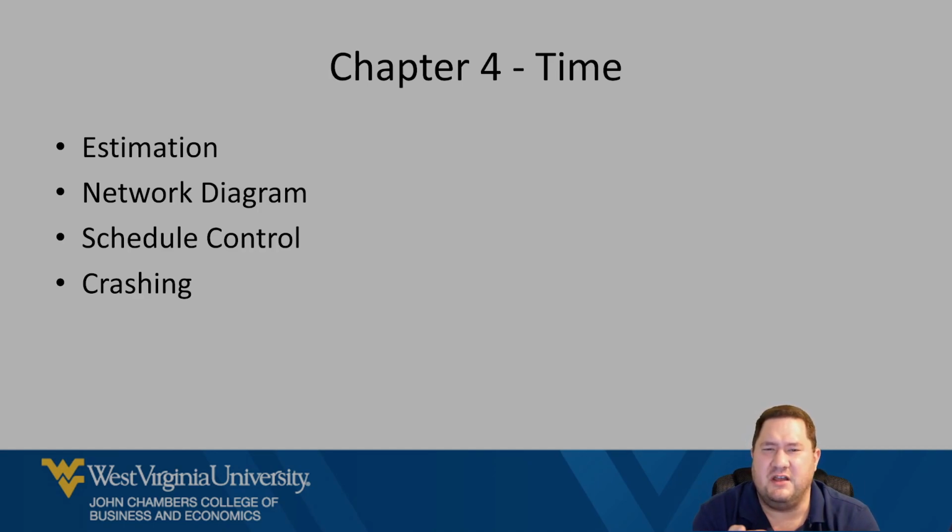This is where we can reach out to maybe experts. When I talk to facilities about the renovation of the emergency department and ask them, hey, you guys have been through a renovation. How long does it take to do this? And they'll tell you, it takes about 2 weeks to do that. And you can ask them these questions and they can be considered an expert. And you can put down an estimate. Or they might say, well, it takes 2 to 4 weeks. Well, 2 weeks, how likely is that to happen? 4 weeks, how likely is that to happen? So you probably could estimate somewhere closer to the 3.